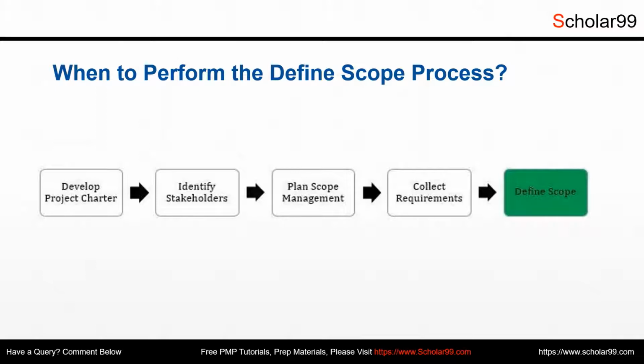and most importantly, the business case that explains the justification of why the organization chose this project, among others, the initial list of stakeholders identified during charter creation, high-level budget, project constraints, assumptions, and risks, if any. Project Charter contains all this high-level information. Hence, Project Charter is a good place to start defining the scope of your project.